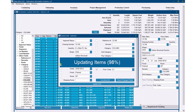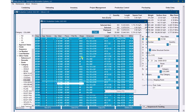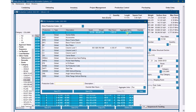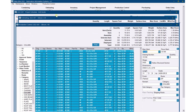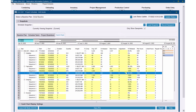Looking at review production codes in production control: C1 is being applied to 303 pieces, 829,795 pounds at 9.94 man hours per ton, whereas everything else is using 8.94 man hours per ton. Going back to the schedule and updating status again, this would change the hours to reflect that new distribution. The estimated 150 hours has now gone to 151 — it can really help you hone in closer to a more specific and accurate schedule.